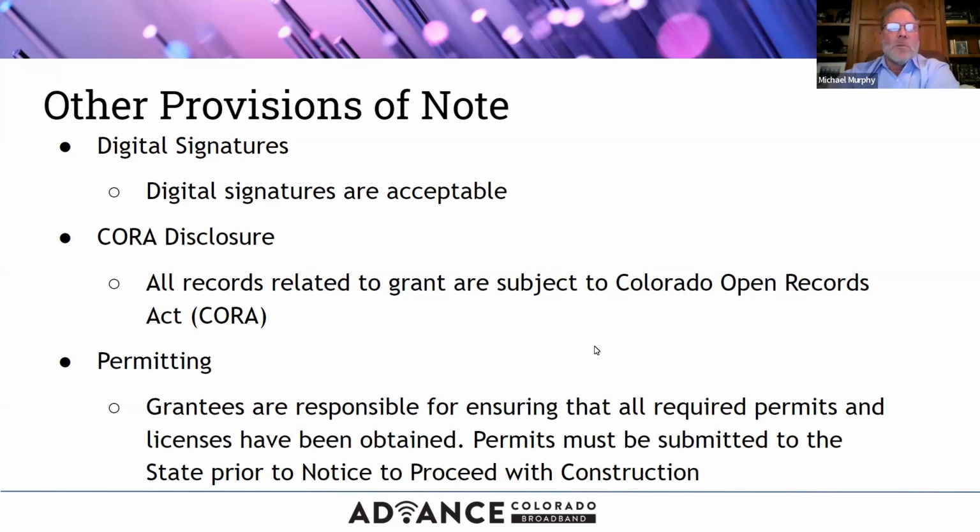And then lastly, permitting. We are expecting the grantees to secure all permitting, and we expect those permits to be submitted to the state prior to the notice to proceed with construction.